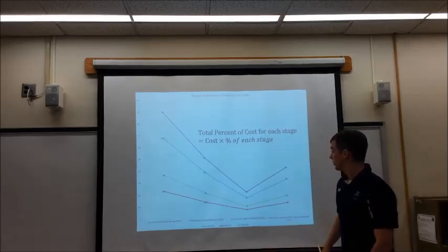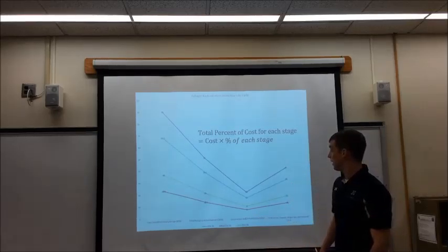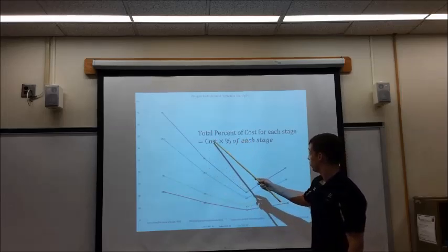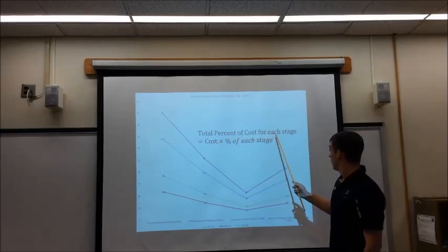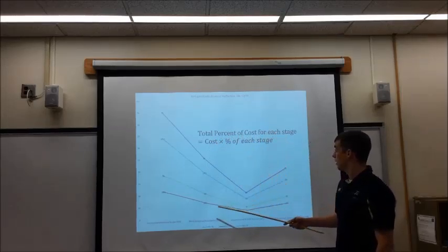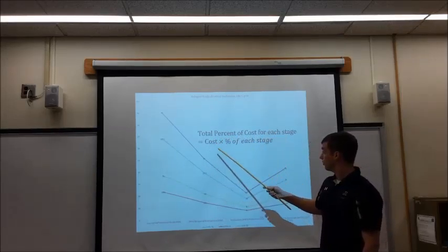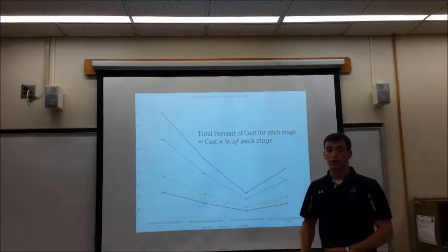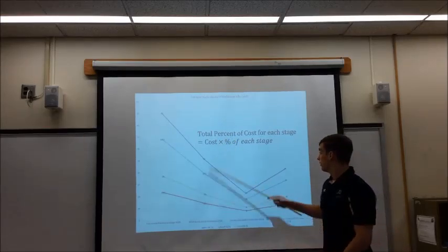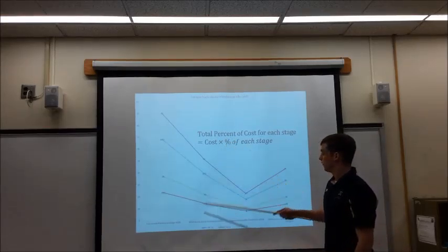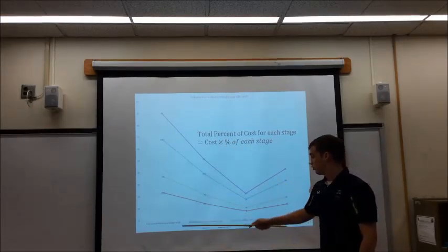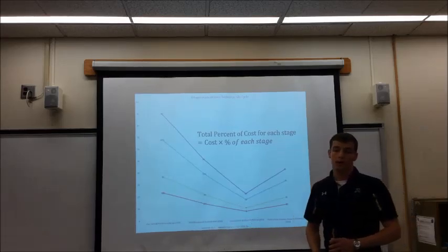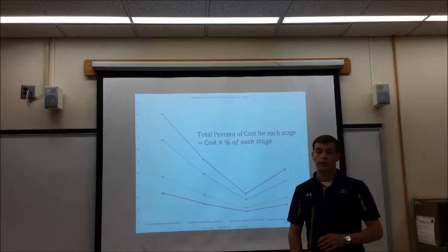This allows us to use the equation where the cost for each stage equals the cost of the alternative times the percentage of each stage — 45%, 25%, 10%, or 20% — which gives us an overall cost estimation for each option.